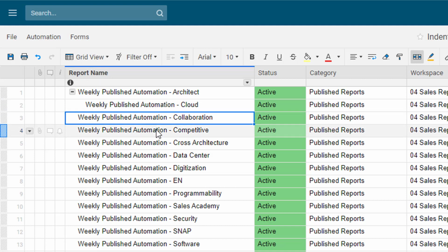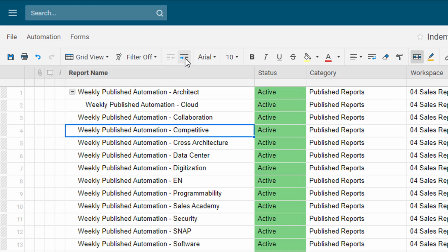You need to select the row below that and click on the indent button, and then the row above it becomes the parent. It's also important to note that the indenting feature creates a relationship between the rows in the sheet, but it does not control any formatting. The indentation also does not get carried through to reports.